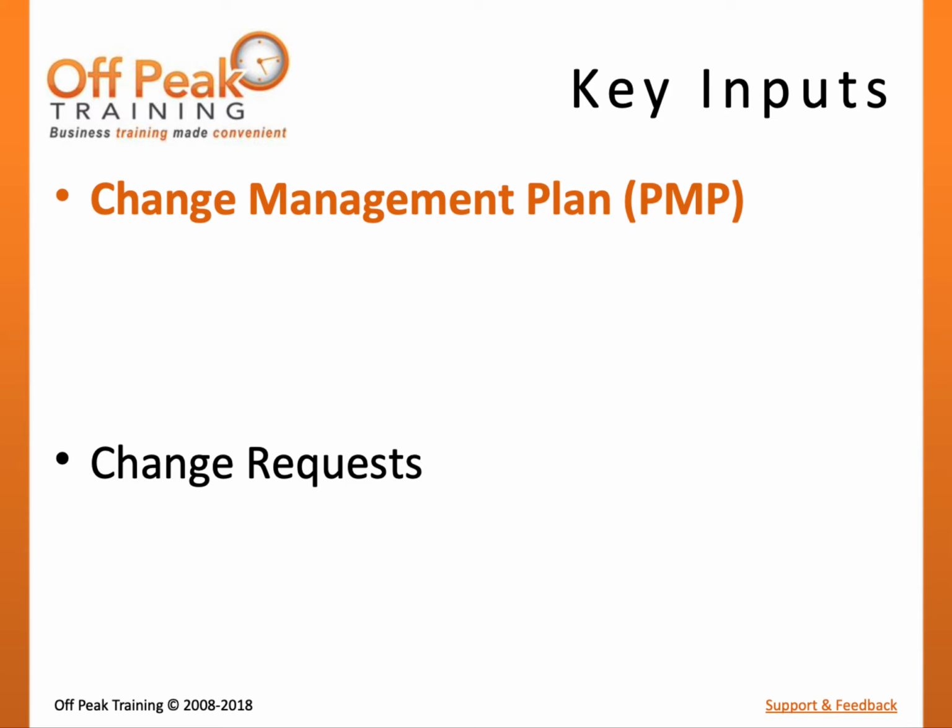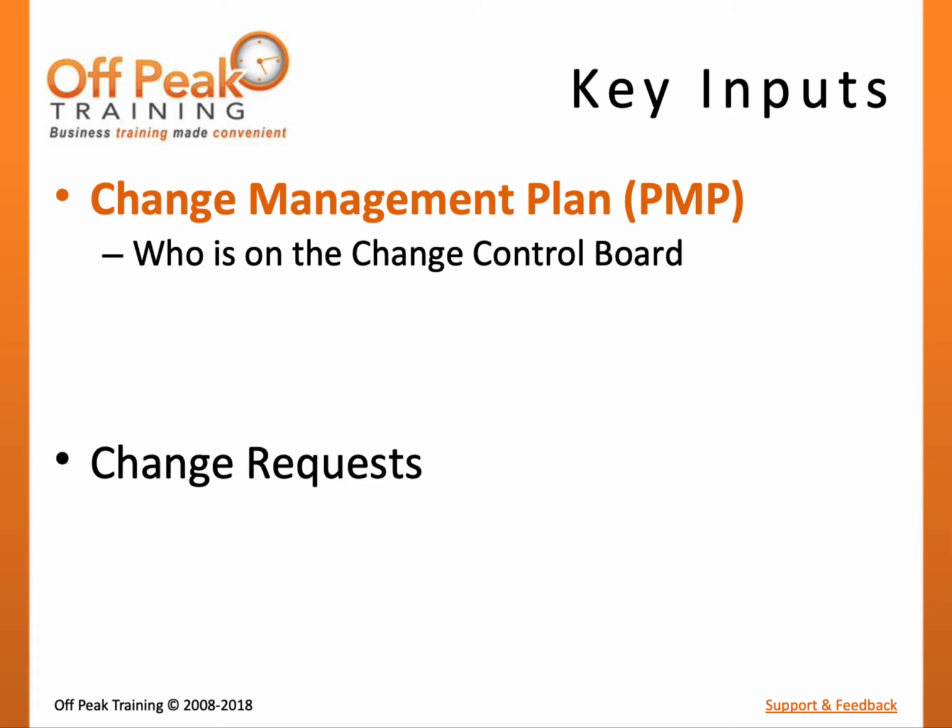Some of the important elements that may be found in a change management plan may include the following. Describing the structure of the Change Control Board. This can include the stakeholders involved, their roles and responsibilities, and the various tiers for projects with complex change control.